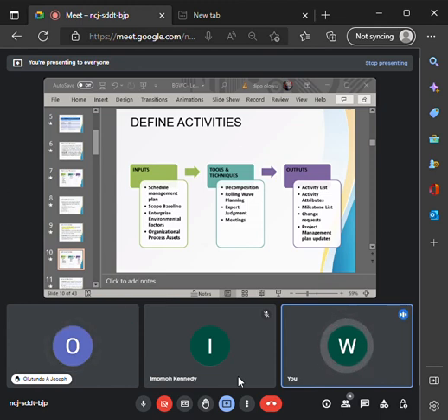So now we're saying that defined activity is now in sequencing. All right, is now in scheduling, sorry. So defined activity is now in scheduling, which is expressly coming to the point whereby you need to further break down and get the tasks that need to be performed. Because now, if you look at the activities you just did for us, the breakdown of foundation, you will discover that it becomes easy for you to assign who is going to clear. It becomes easy for you to assign who is going to do the mapping, who is going to do the digging, who is going to do the blinding and who is going to mix the concrete and granite and everything together. It becomes easy for you to assign who is going to perform the block work. Do you get it now?